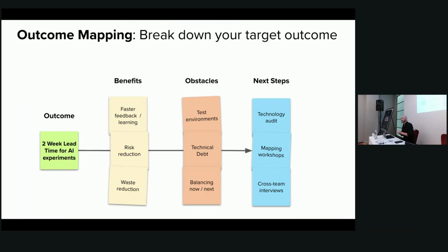We'll talk about pains, goals, questions, ideas, and then general context, just to get a brain dump from everybody. And then we'll do affinity mapping, and then we'll zero in on what the target outcome is. So if you don't know what the target outcome is, that's how we get to that. We sort of distill it down from a bunch of raw material.